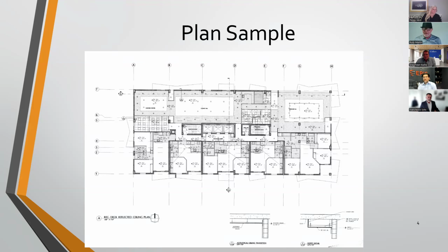And this is why you lean back on the owner's rep, and they make a call to the contractor and say, okay, why are you so high here? Why are you so high here? Not that they're trying to beat us up on price. They just want to understand our means and methods and our approach in pricing this deal. So that's when you get that owner's rep involved. That's when they have a conversation with the engineer, because the owner's rep and the engineer have seen hundreds of bid forms. They know what the industry average for these items are. And that's why it's so crucial for people to have an owner's rep and an engineer that is experienced, so that they can reference that, make sense of it, and have that conversation.